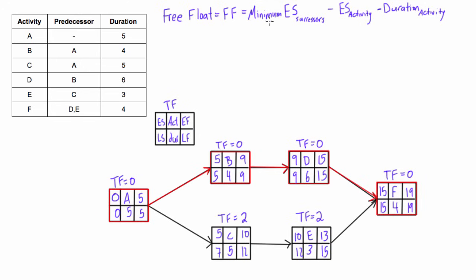The formula for free float is: free float equals the minimum early start of all successors, minus the early start of the activity you're looking at, minus the duration of that activity. For example, activity A has two successors, B and C, so we take the minimum early start of those two. We'll write the free float below each node.